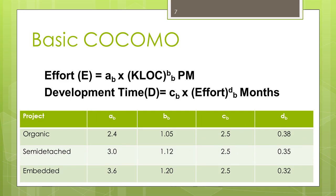This is the constant table for basic COCOMO. Development time is the estimated time to develop the software, expressed in months. Effort is the total effort required to develop the software product, expressed in person-months — person-month is the unit of effort, and months is the unit for development time.